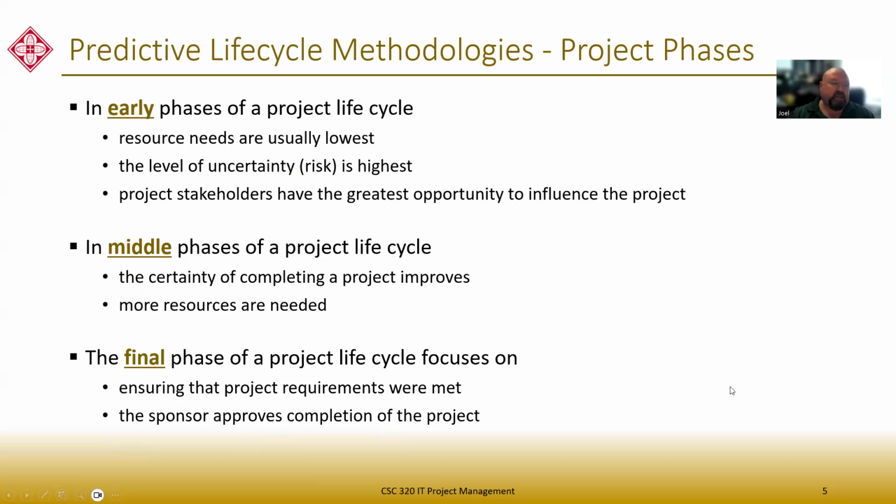Those phases at the beginning of your project are most likely going to incur the lowest amount of risk, the lowest amount of resources, and project stakeholders have the highest opportunity to change your project. Why is that? Because you're still shaping the project, right? You haven't really set anything completely in stone yet, and you haven't actually built a lot of the project. So that's what those early phases typically look like.